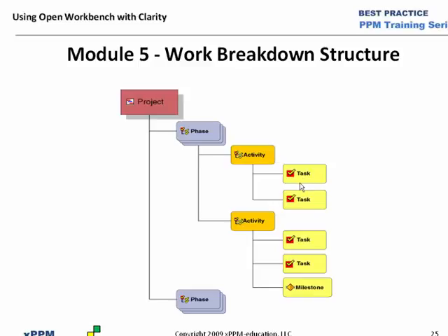We'll go from this task to establish the sequence, and to milestones also. Another thing that when we get to assigning roles and resources to tasks and put their ETC, that will be at the task level, not the summary task level, not the activity or phase or whatever we call those. So that's a very important distinction with Clarity and Open Workbench.